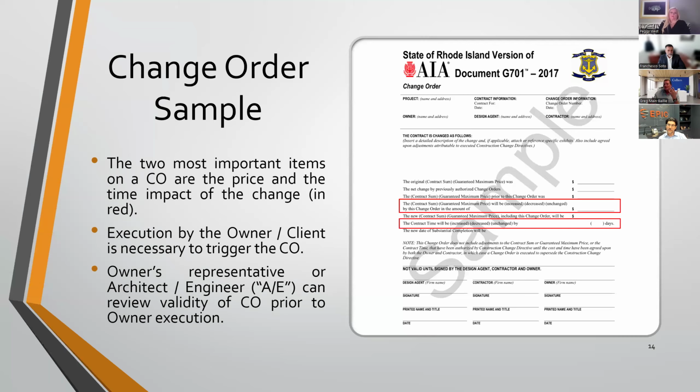And that's where you really need to take the opportunity, because the projects are 12, 24 months long at a time, take the project at each month to reevaluate your budget assumptions, reforecast what your spend is going to be, and communicate that with your board members on a monthly basis, keeping yourself out of trouble and really trying to forecast the impact of dollars to your project.